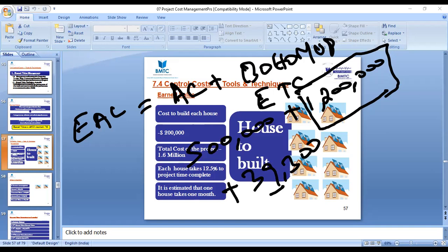You'll be giving from your pocket or you'll be taking from the project and spending on the cost engineer who's going to do the re-estimation. So you need to add this expense in the project expense, right? So what is your estimated completion? 1,739,300, right? Yes. So if the examination is asking you, try to work out with the bottom-up ETC.